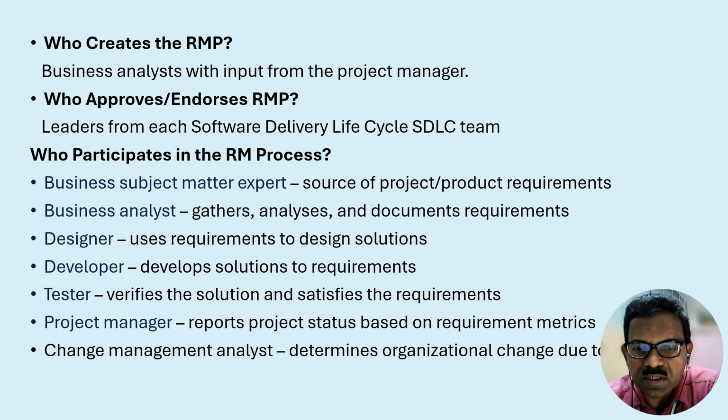We'll see how it traces to the requirements, whether the requirements are satisfied at each module level. Once you develop the entire project and realize that something is lagging, it is very difficult to realign things, and it is a costly affair. That is why normally at every stage we have to verify that the requirements are being incorporated or not. The project manager looks at the overall control, progress, and how things are running.